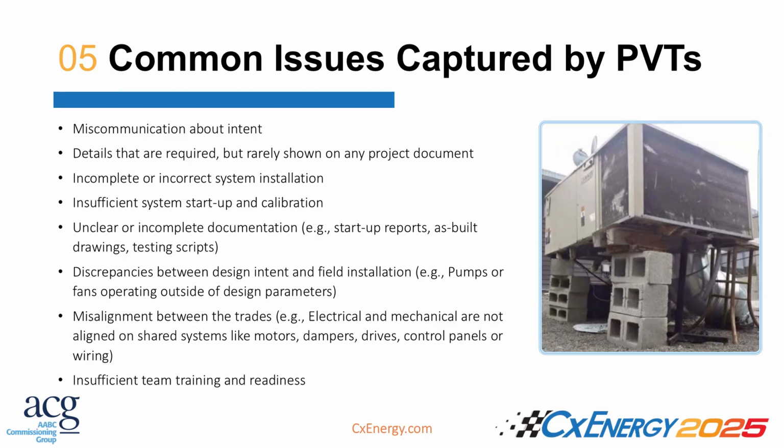If you do it in a timely manner, and obviously the schedule gets impacted, so it's important to make sure that everybody knows about it throughout the whole project. You can't bring this up at the last minute, so it has to be part of the commissioning plan at the beginning and mentioned all the way through that, hey, we're going to be doing these pre-verification tests, so get ready for it. We're here to help you. There's no consequences, like Alex said. You still have time to go through any issues you find.